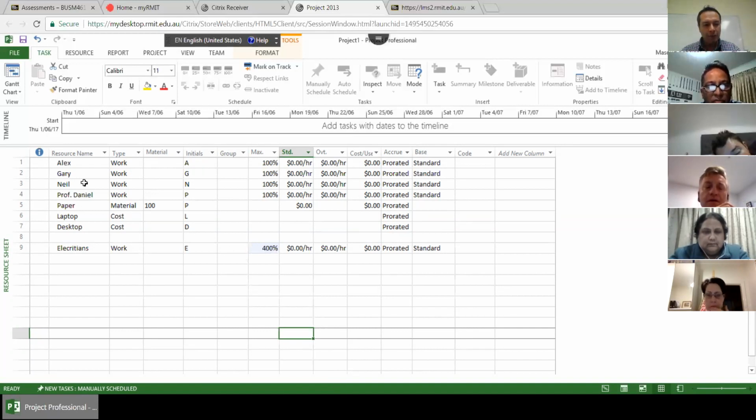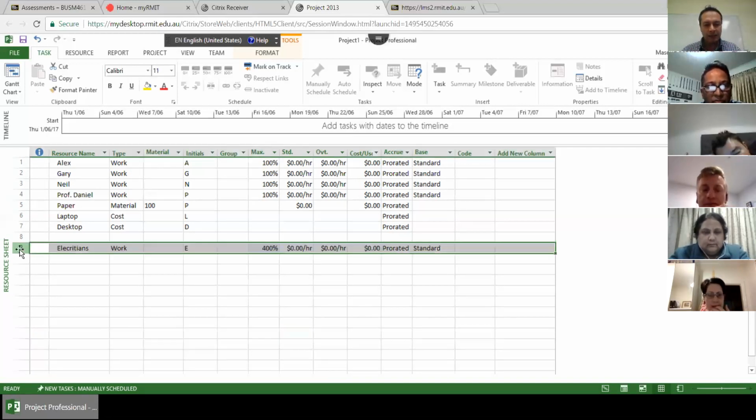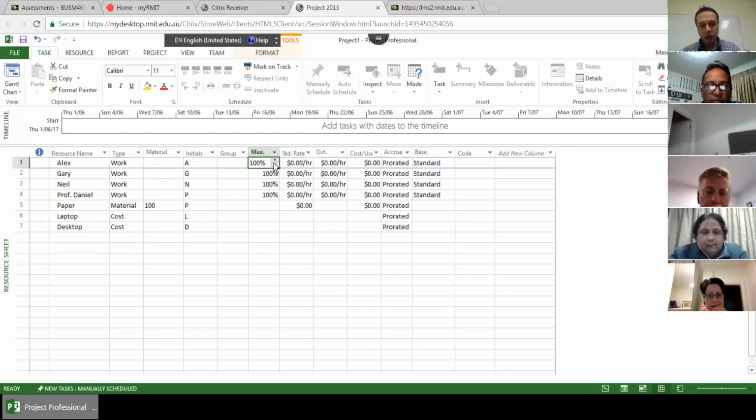Sometimes, for example, if Alex is not available full-time in this project and he can only work 4 hours a day, you will set it as 50%. 50%. Is that clear? Yeah. Yep. Okay.